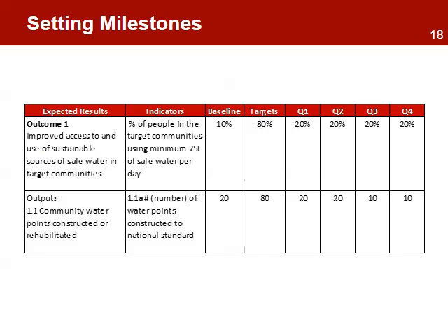Milestones are like interim targets. They help monitor the performance of the project over long periods. The milestones can determine if the project is achieving the planned rate of progress. For example, the project can decide to monitor its performance by setting quarterly milestones. As the project makes progress, the project manager will be able to use the milestones as points of reference to determine if the project is delivering results as planned. Deviations from the plan will signal the need to review the initial assumptions of the project and make the necessary changes.